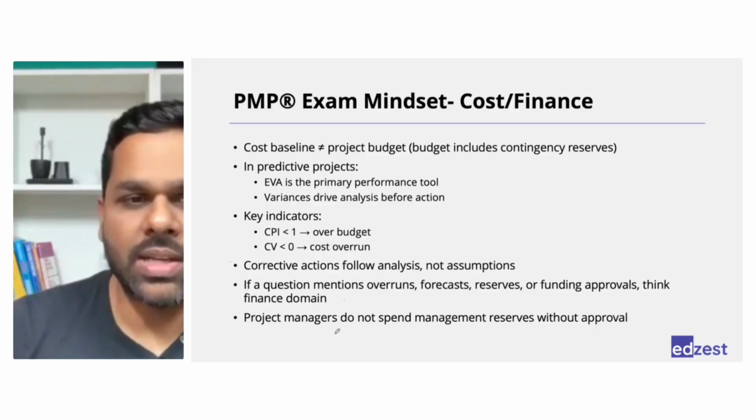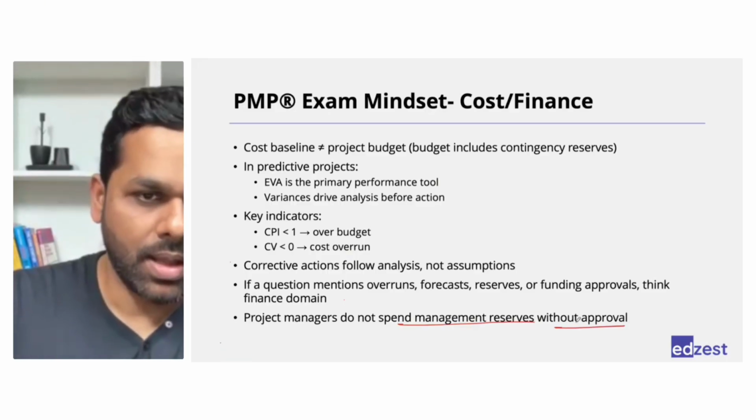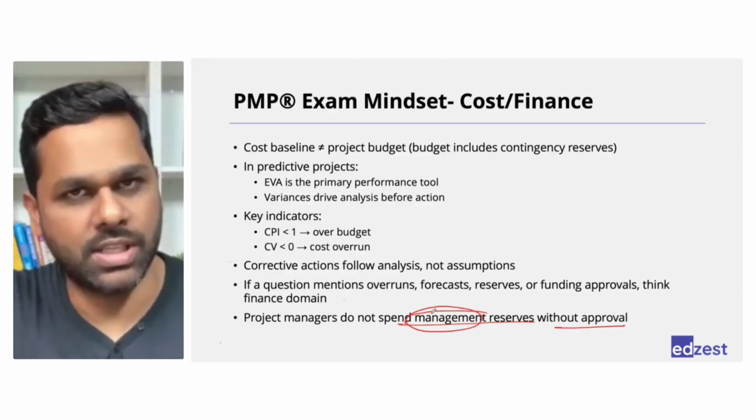Ensure that as a project manager, you do not spend management reserves without approval. Management reserve, the name itself suggests, is for the management, not for us.